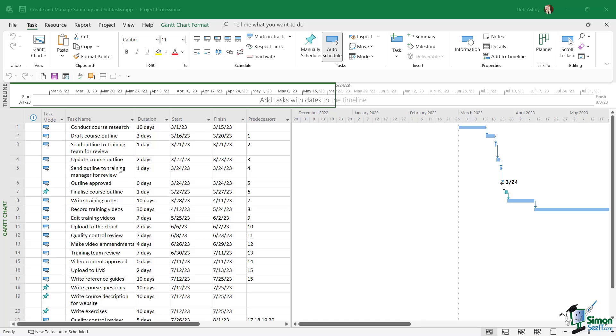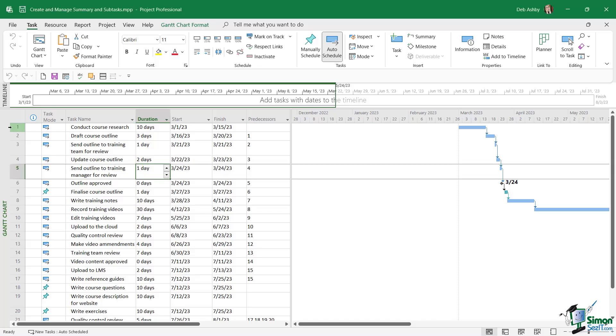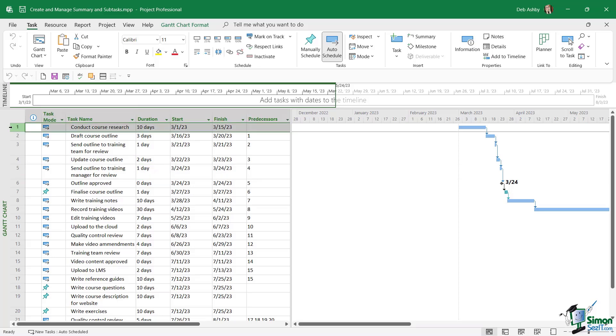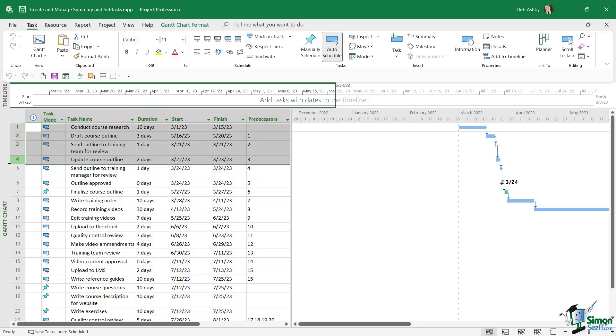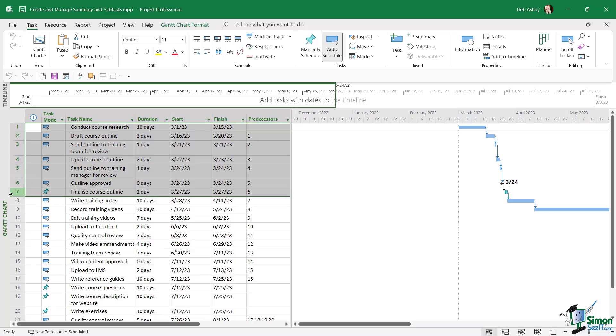What I'm going to do first here is I'm going to select all of the tasks that belong to the first section. And our first section is going to be called preparation phase. Let's hover our mouse over where we have task one until we can see that little black arrow. I'm going to click and then I'm going to drag down to select all of the tasks that belong to this first phase. So that is basically going to be tasks one to seven.